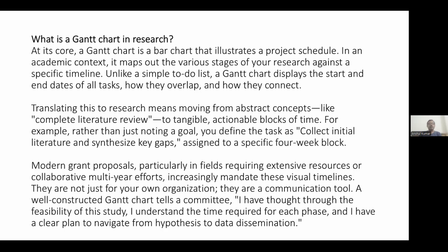Translating this to research means moving from abstract concepts like complete literature review to tangible, actionable blocks of time. For example, rather than just noting a goal, we define the task as collect initial literature and synthesize the gaps assigned to a specific 4-week block.